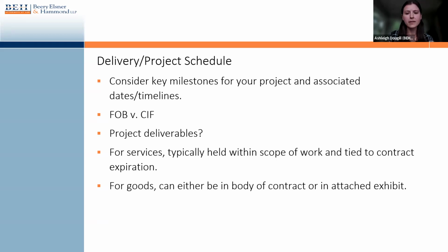In contrast, CIF means cost, insurance, and freight, which means that the provider carries liability for goods until they're in the city's possession. This is my strong preference. It means that they carry risk and title until the minute that they're in your physical possession.